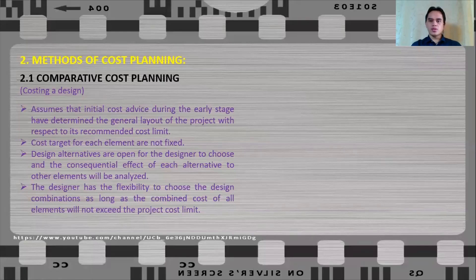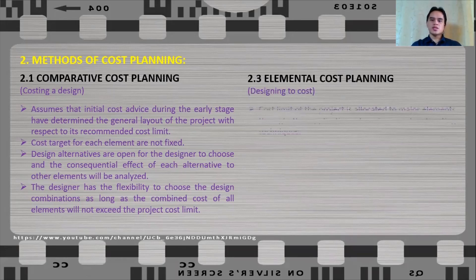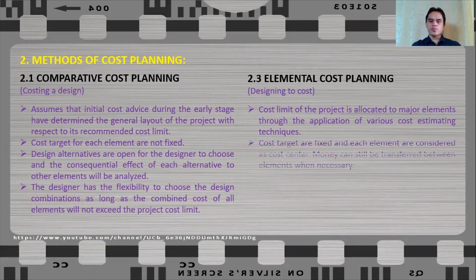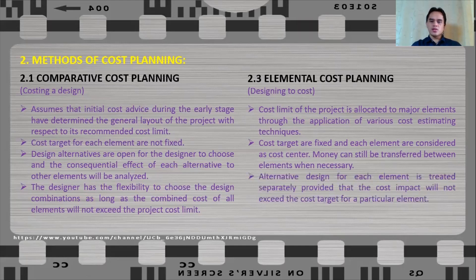The next commonly used method is elemental cost planning, also known as designing to cost. In elemental cost planning, the cost limit for the project is allocated to major elements through the application of various cost estimating techniques. The cost targets are fixed and each element is considered a cost center. Money can still be transferred between elements when necessary, provided proper cost control procedures are observed. The designer is constrained by the cost target and must ensure that design alternatives do not exceed the cost target for a particular element.